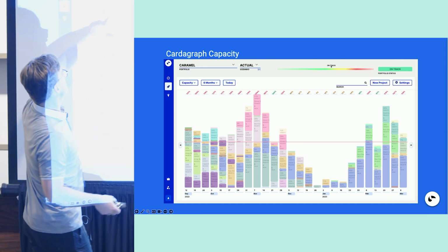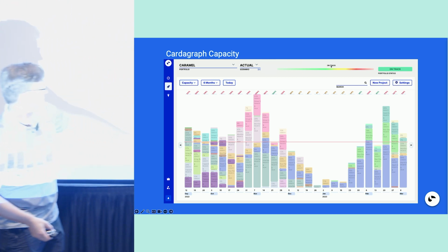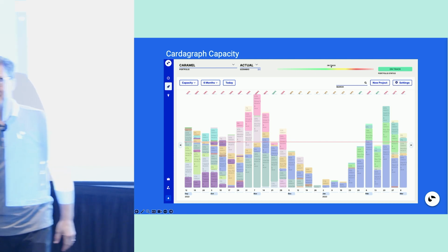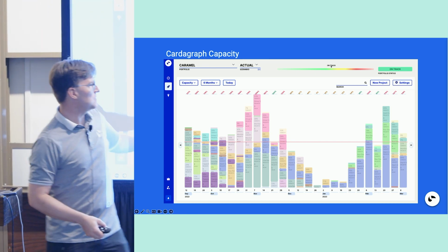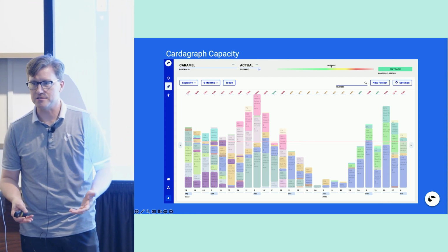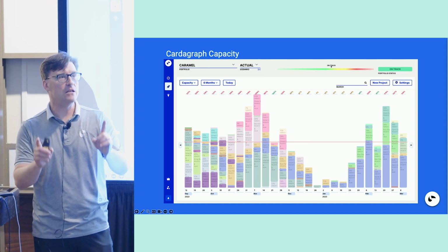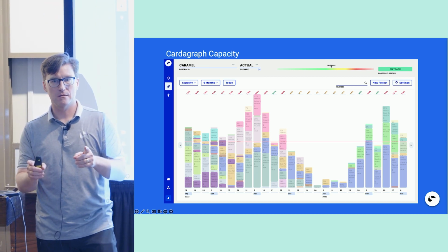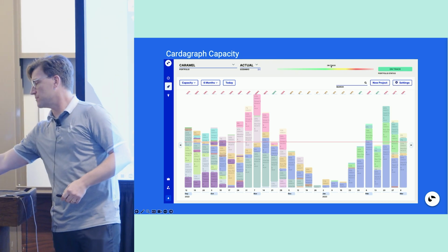So now you understand those numbers. 204% of average here, 5% of average over Christmas, right? And if you know that those dips are going to happen, you could actually move projects and say, you know what, we traditionally don't do anything over Christmas, so let's just give everybody a break and let's pick it up after. But I know that it'll happen because I can see what we're used to doing, and we can do a really good job of it.